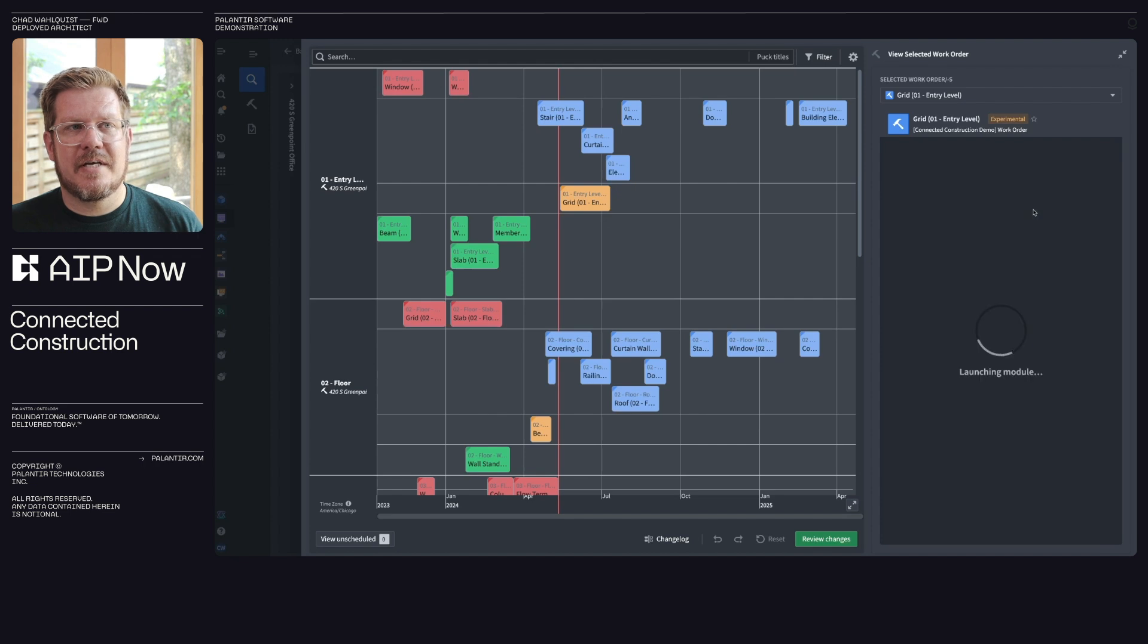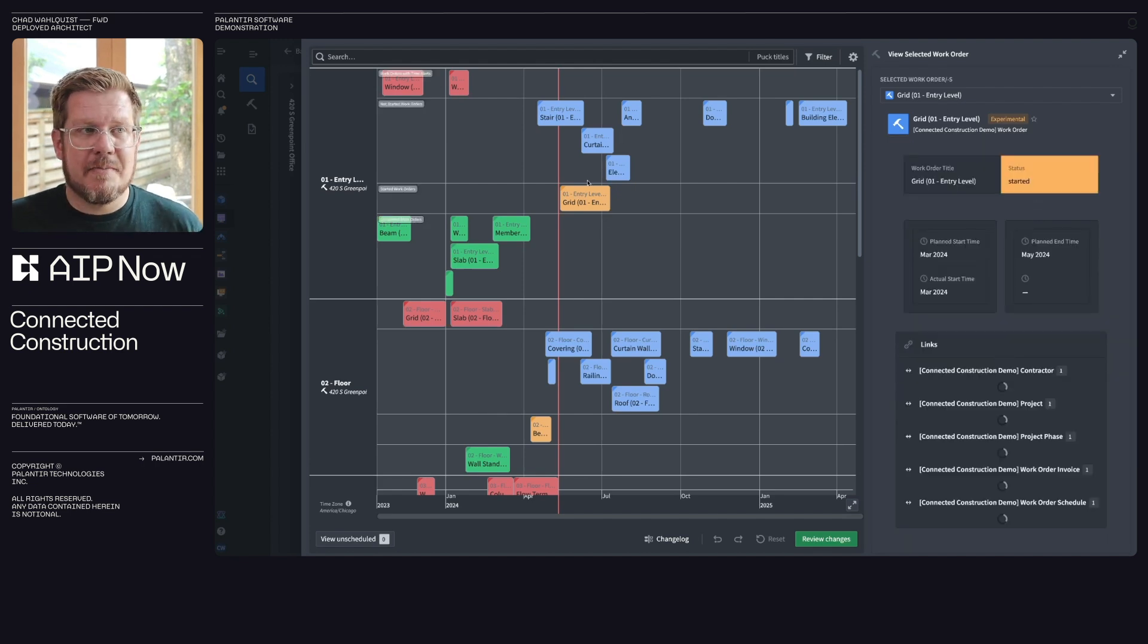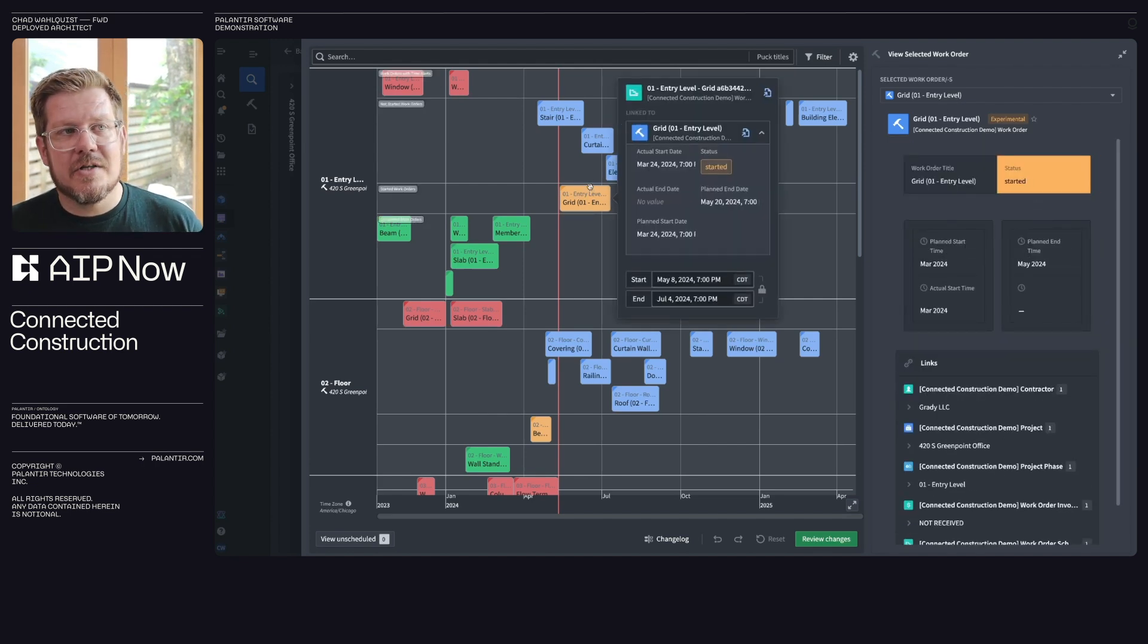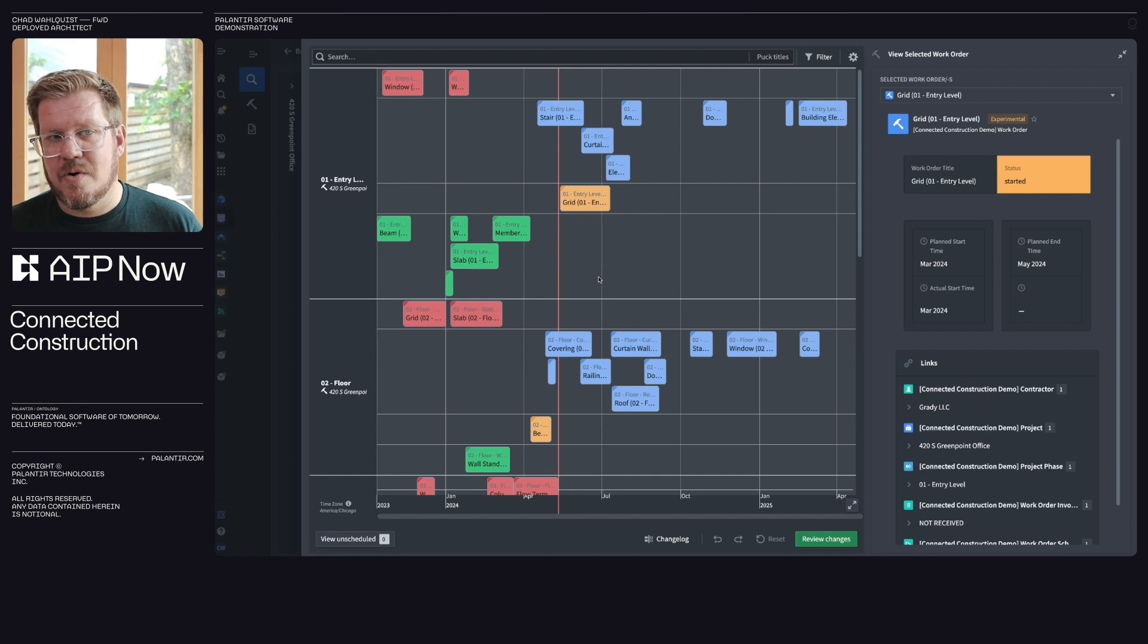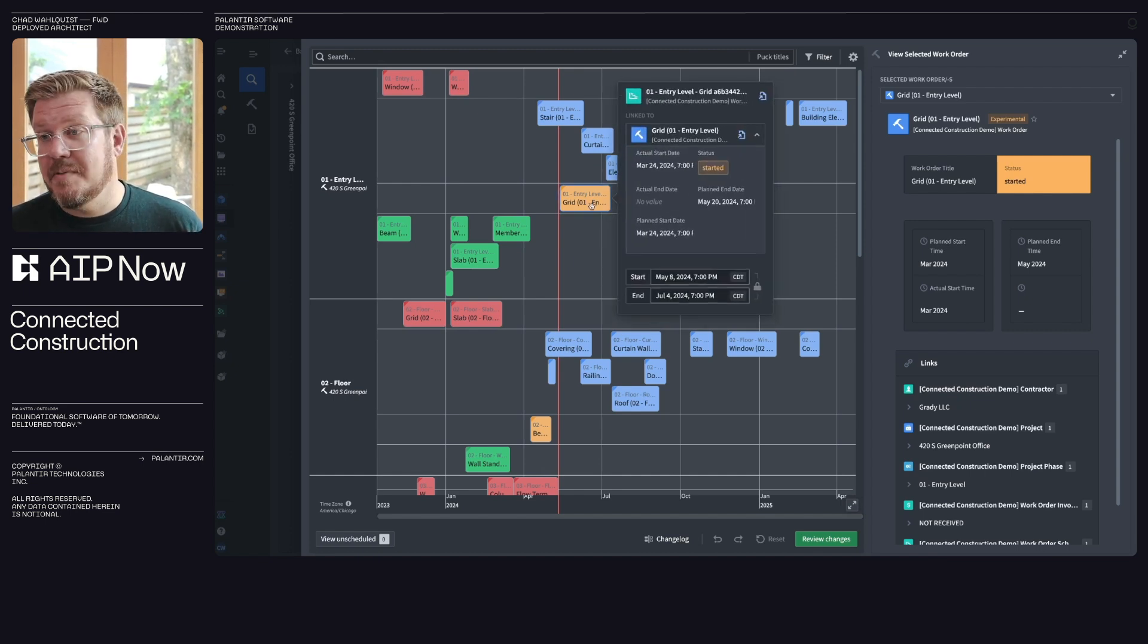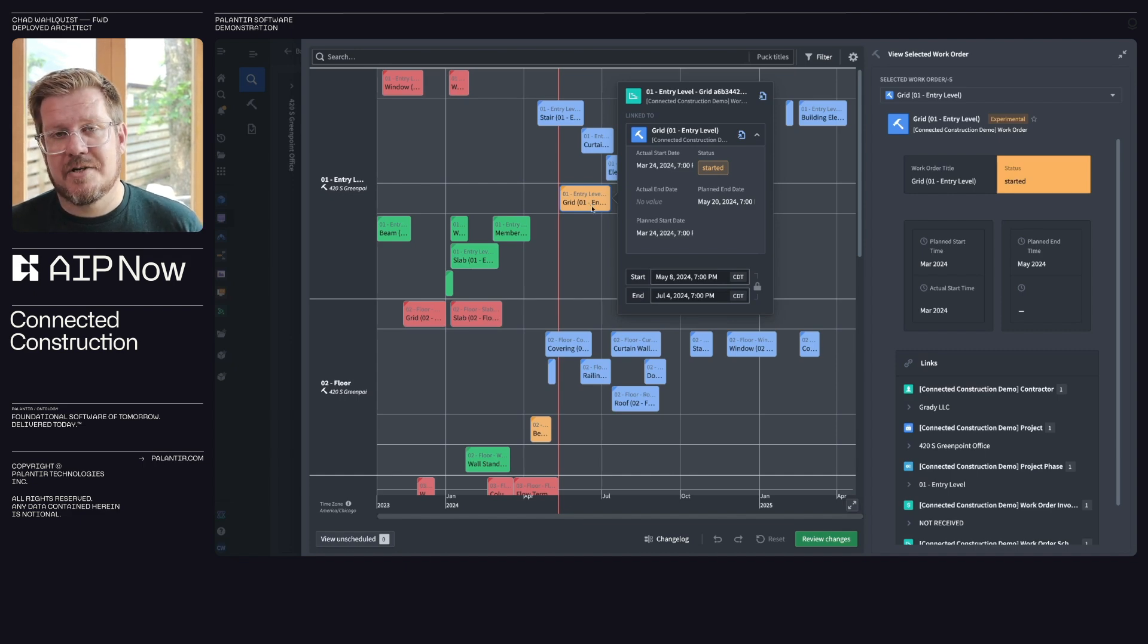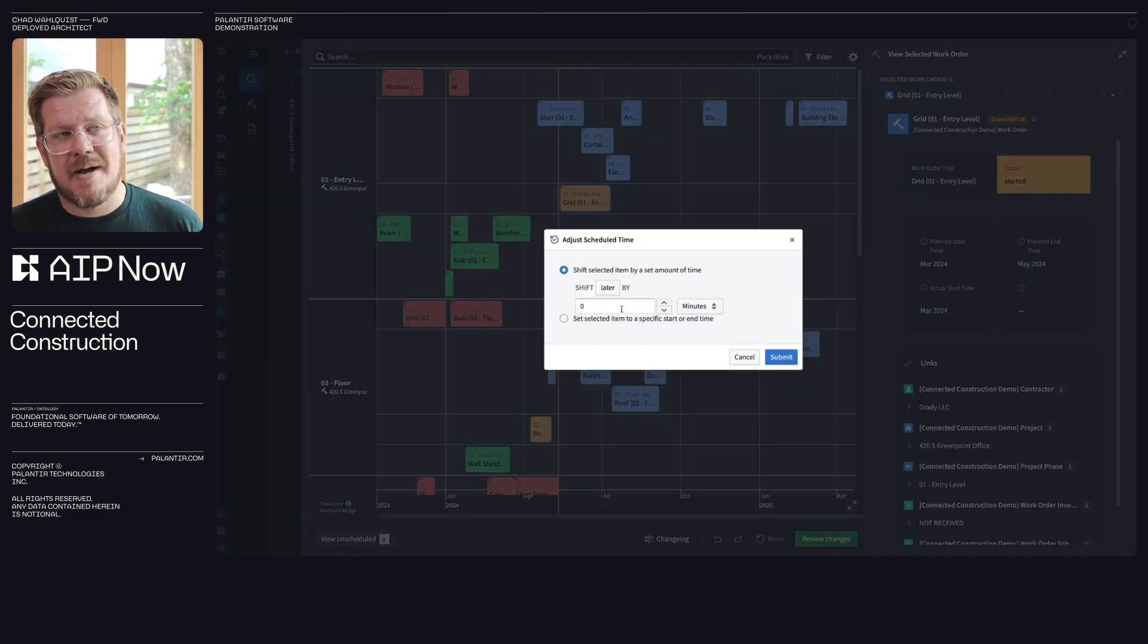If we click on the schedule, you can see here, this is some of our dynamic scheduling primitives. So I can understand on the pucks, all the different work orders, how they're laid out in the order they need to happen. So I know, for example, in this case, maybe I'm going to be behind on materials. There's a shortage of this, and there's some supply chain constraints. I'm going to need to move this back by about four weeks.